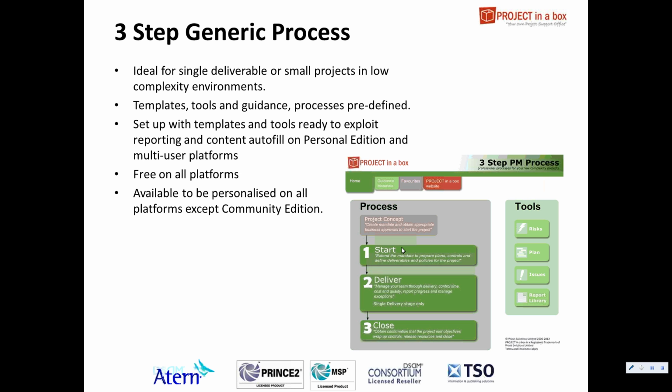Three-step generic process is for slightly more sophisticated projects, still essentially low complexity though, but we're properly into the project type model now, and this is one of the most popular methods that we provide. Concept, identifying what's required for the project; start, to start up your project; deliver, to deliver your project; and close, to close out your project. It provides a range of templates using PRINCE2 templates and also other templates we've provided, all hooked into task, risk and issue management, etc. And this is standard across all the products.